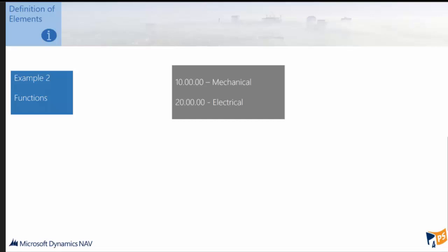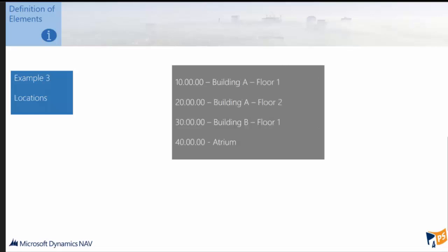If you've got different people working on the different projects, that can be useful for setting up things like approvals. However, if you want to control it all within one project, you've got the same or similar people working on that project. You want, for example, to do applications on that one project, but you still want the breakdown by mechanical and electrical. You can use a structure like this, and then within the one project, you can see the breakdown by those particular elements.